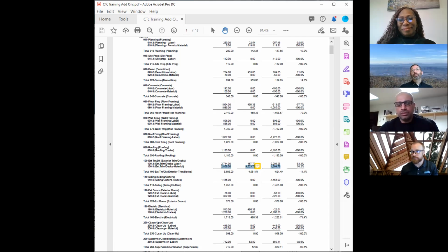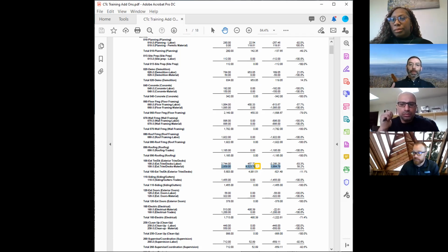The information here comes from a handful of places. When everyone codes into T-Sheets, both the field guys and the PMs and the PDs and the designers, they code their line item and they code it to a particular job in T-Sheets. In order to fill out the material quotes, the estimates will come back in. They'll get signed off on, coded by the PM, coded by the PD, and sent in to Beth. Beth enters into QuickBooks, and then you get cost in your job cost. Same with your trades.